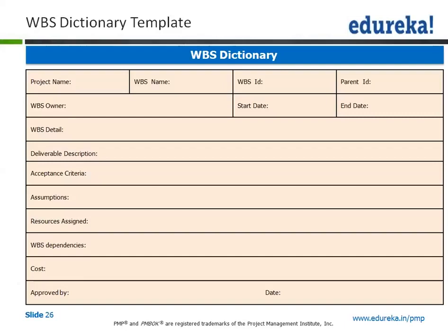So once we arrive at the actual cost, by that time we are very clear that we have paid good attention to each of the sub work packages so that we are not missing any of the activities. And the main thing our WBS dictionary also covers is the start date and the end date of a particular activity, because this is where we need to schedule certain activities, to look at the dependencies, to look at the leads or lags perspective, which has to be done first, which has to be done last.